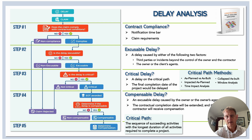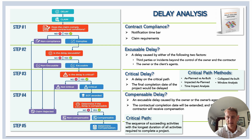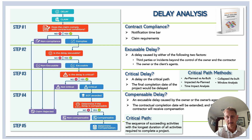If the delay is judged as excusable, one moves on to step three — criticality. A critical delay is a delay on the critical path, and the result is that the completion date will be delayed. The critical path is formally defined as the sequence of succeeding activities with the longest duration of all activities required to complete a project. Anything that happens within this sequence would ultimately postpone or delay the completion date.